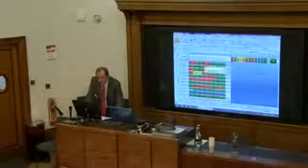Down here in the lower section of the plan, it's looked at each of those metrics and it's split it by phase or by time frame. So I can see that I've got 2 logic problems in Q1, I've got 11 high floats in Q1 as well. So as well as on the right hand side doing a total for the project, it's also splitting those metrics down by time frame.